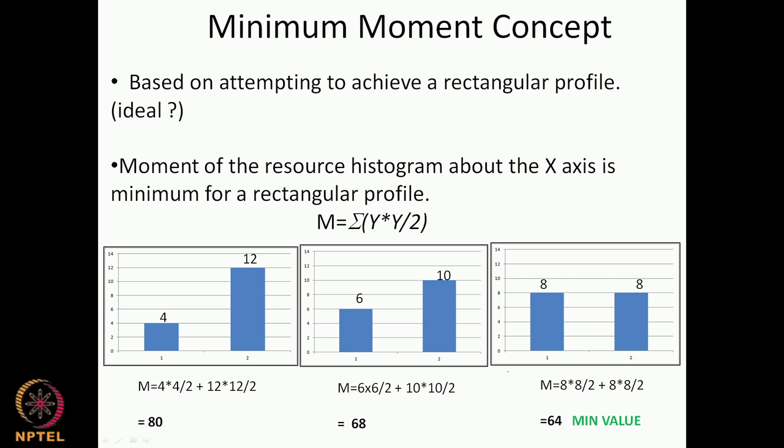What profile is the best for me? This is where the concept of minimum moment comes in. Remember, what we are trying to do is get as flat a profile of the resource as possible. This is ideal, but we want to get it as close to this as possible. And if we go back